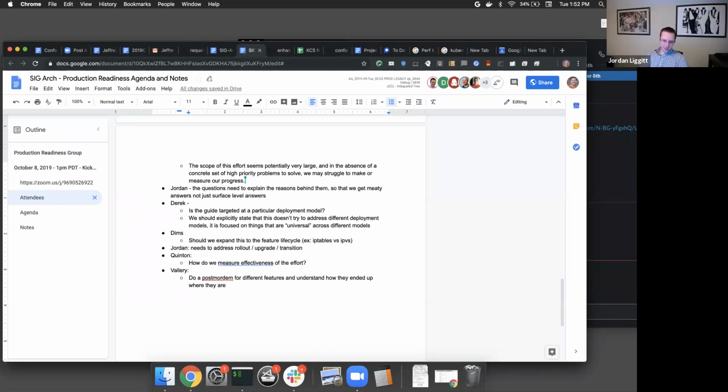Okay. I think it's easier to ask these questions in the design phase than to say, we're ready to promote to beta, we're ready to promote to GA, can we have a +1 on our PR? And then we're like, wait, does it scale, can you upgrade it? Maybe you should fundamentally rethink your design. That's a really awkward point to be asking these questions.